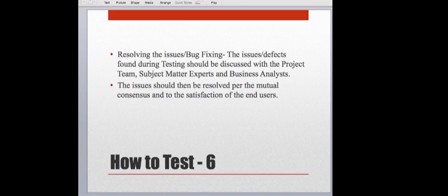And then typically what would happen in this situation, we always had UAT that was a couple days long. So anything from that first day that would get fixed, there would be a build that would migrate all of the fixed code to that test environment that night. And then the second day of the user acceptance testing, they would be able to look at it again and have a level of confidence that we resolved the issue.